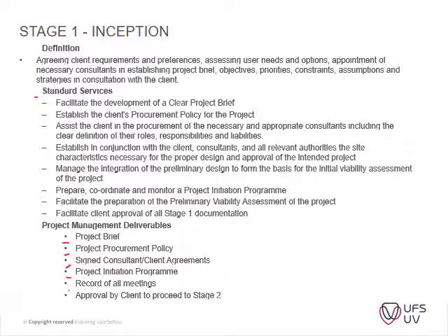Then record all your meetings. Very important. Approval by the client. This might seem as a given, but many times you don't have signed documents that you can proceed, that they have accepted the documentation that was provided to them, and suddenly they make changes. But this is not what we wanted. We wanted a smaller building, for instance, and so on. Okay, so it's good to have a document that's signed off to proceed to stage 2.